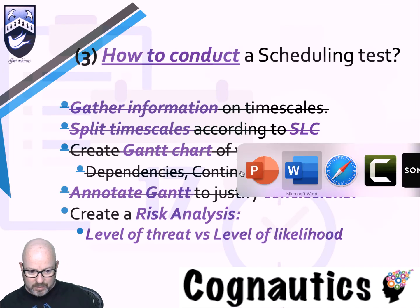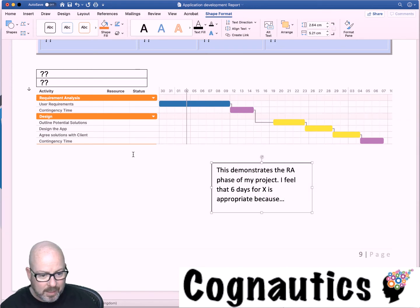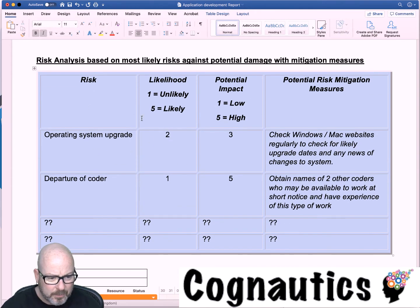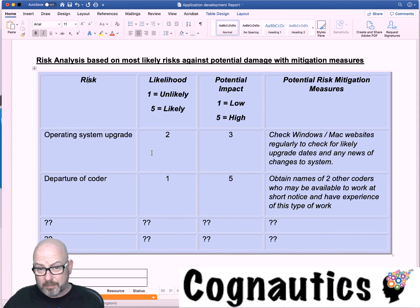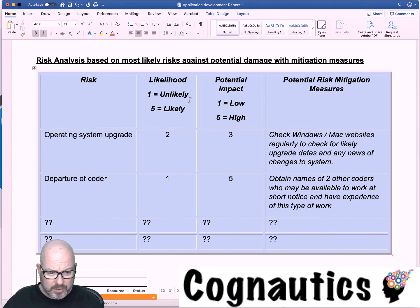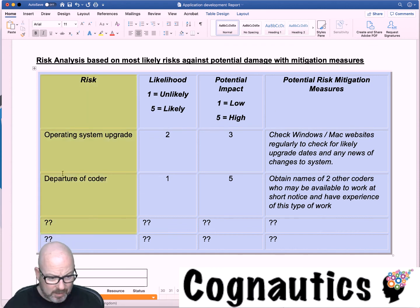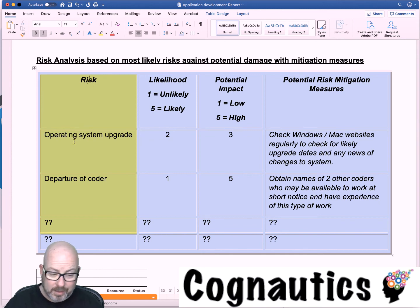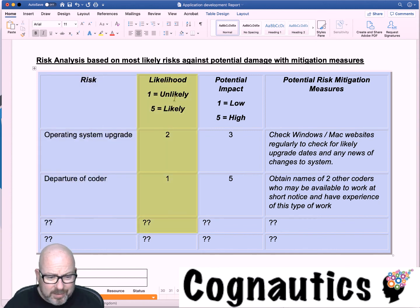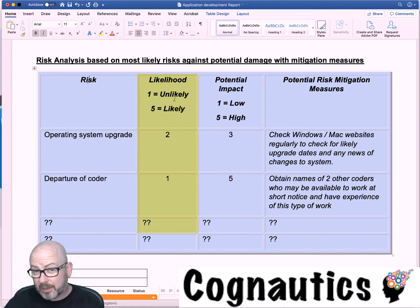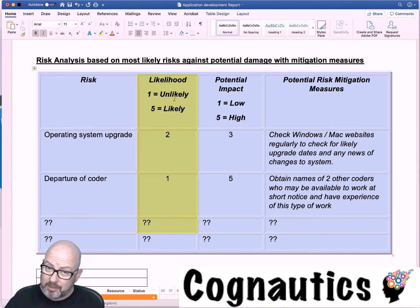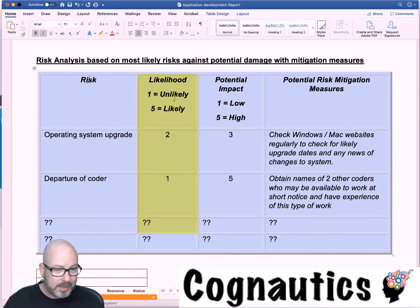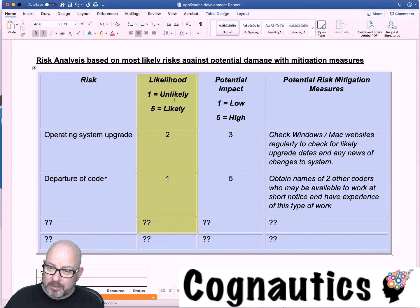Last thing is the risk analysis document. I have made a simple table. It has got four different columns. In the first column is a risk to your project, in other words Windows or Mac upgrading their operating system. Over here in the second column I'm talking about the likelihood of that risk happening. Is it likely or is it extremely unlikely? Example: it raining over the next week in the UK, very likely. An earthquake happening in Crawley, very unlikely.